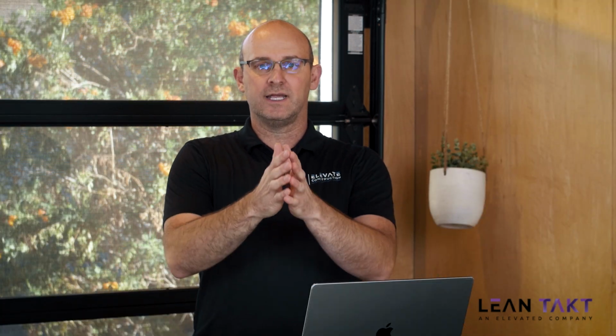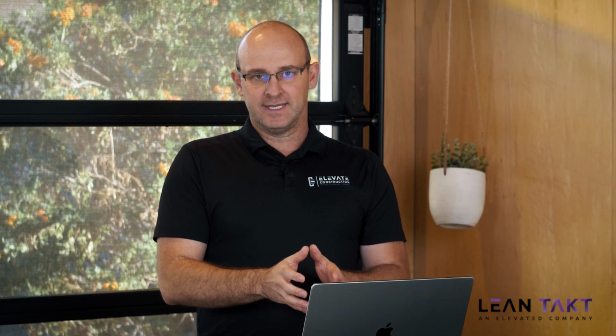The last thing that I would say is that the Last Planner system is only as good as the deliverables are used. And the deliverables are the macro level takt plan and the procurement log that keeps everything on track, the pull plans, which really make sure that we have the right sequence, the look ahead plan that makes sure that we're making work ready and looking for roadblocks out ahead, the weekly work plan, which is what we use to build, that shows handoffs and commitments, the day plan,